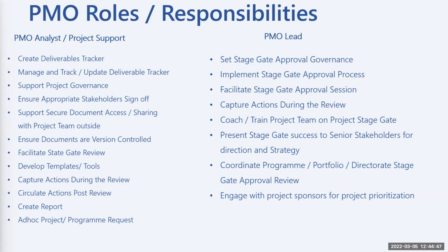So when you are creating a dashboard, we haven't talked about reporting in this session, but when you are creating a dashboard, there are some of the questions around gates or stage gates that you need to provide to the senior stakeholders so that they know how the project or the program is progressing, to say, okay, we have 2 projects that are coming to gate in the next 2 weeks and their deliverables are on track. So those are the kind of reporting that you need to create when you are creating a report for stage gate. And it's almost similar to PMO lead.